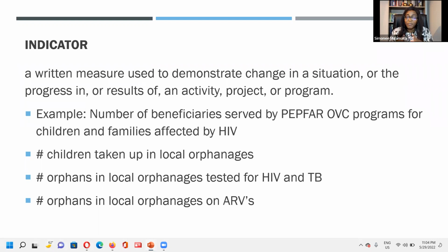It is very important, because if you don't have a measuring tool, you cannot measure anything in these processes that I have mentioned. Every process has its own indicators. We have our input indicators, output indicators, outcome indicators, and impact indicators. So we need to understand that.